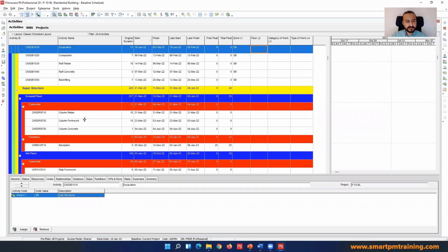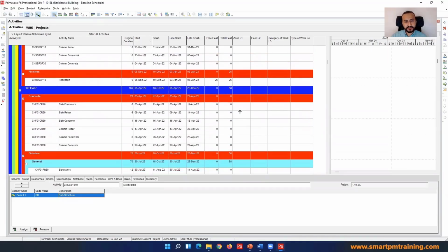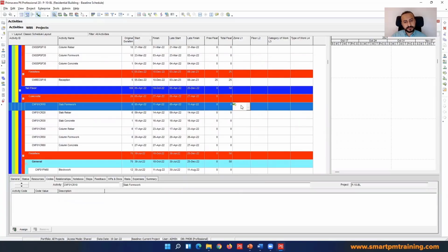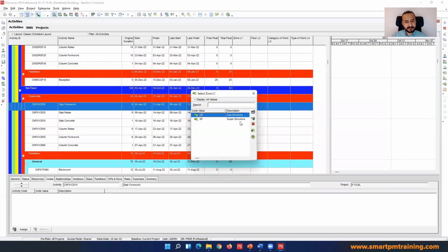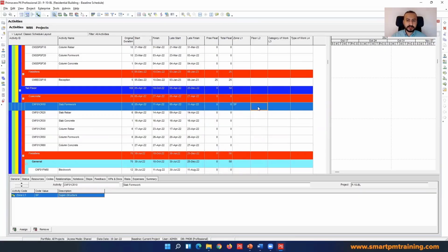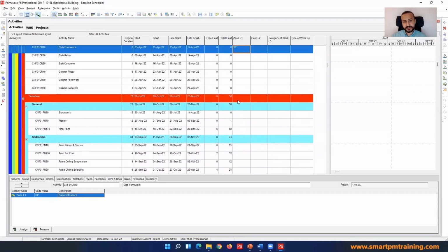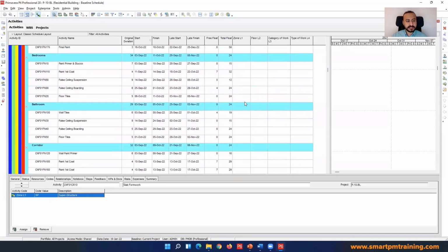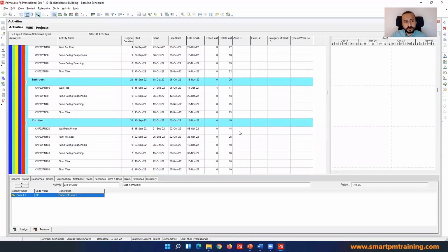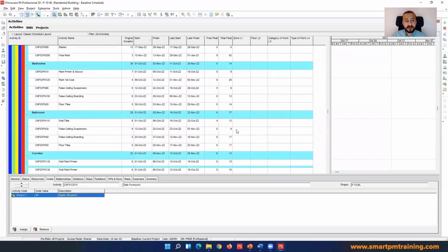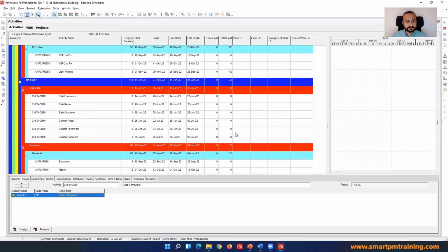So for example, here, and let's take the first floor. Okay, I will select that. It's a superstructure, not substructure. So it's superstructure. I'm gonna choose superstructure. Then all activities here are under superstructure, right? So you're gonna select all, because all activities under all floors are actually superstructure.